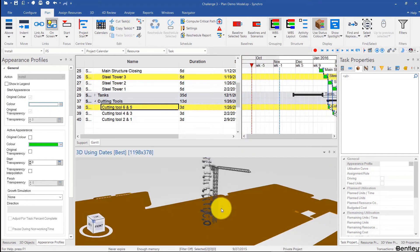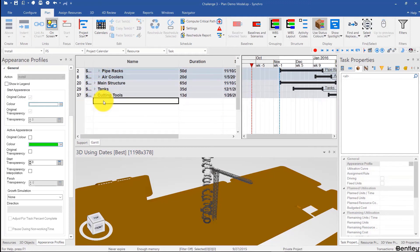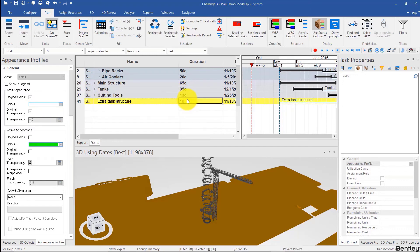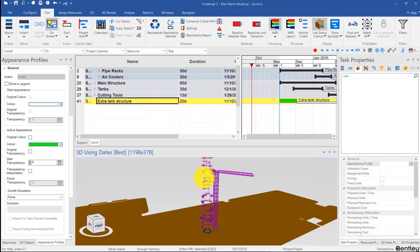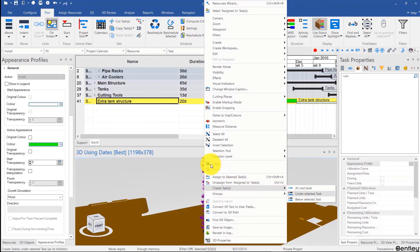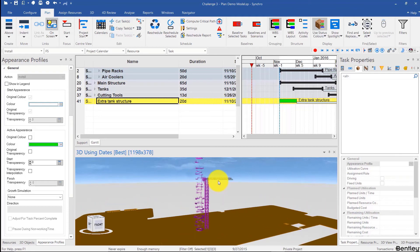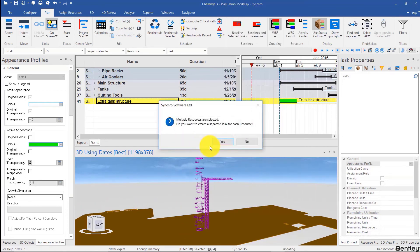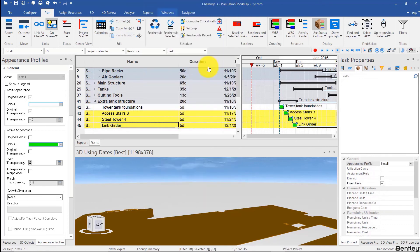Going all the way back, we still have this structure and this girder. So we can put these in extra tank structure — give that maybe 20 days — and then just add the steel structure and the girder. Actually, the steel structure goes first, then this, then the girder. We also forgot the foundations first, so I'll click the foundation, then this, then this, then that, right-click, create tasks under selected task. For the foundation we're going to use concrete; for the steel we're going to use steel — so right-click, select assigned resources, let's use bottom to top. Then we can link them with the tanks: steel structure and access stairs and steel tower — Ctrl+L — then reschedule.